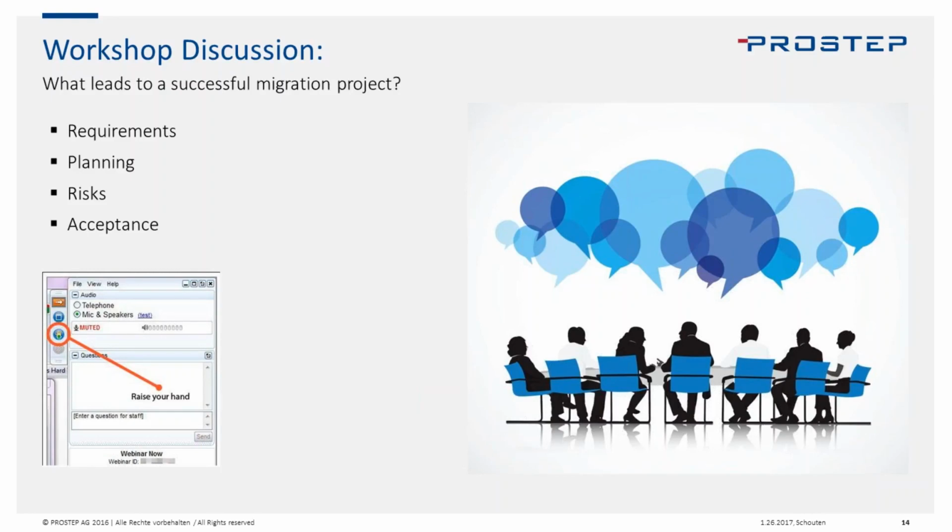I'd also recommend that you focus on key users, bring them into the project early. These might be one person from each department that's going to be adopting it, and make them power users. Go through the advanced training. Make sure that they're able to answer questions that the other people in the department can rely on them for, in order to know what the process is and how to use the system. So they can help the adoption of that new PLM system. But certainly, make sure they know the value of the new system, what advantages that system brings, and bring people in early and have their voices heard.